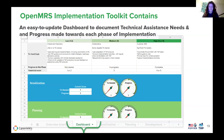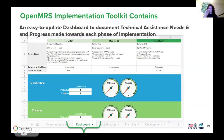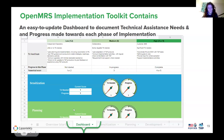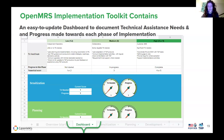We put together a very simple dashboard to document the technical assistance needs and progress made towards each phase of implementation. It has across the different stages — sensitization, planning, and development — what kind of technical assistance you would need and how far along you are. So just at a glance, you can see where things are in terms of your implementation, and we provided guidance at the top for what these numbers can mean, to help you use the toolkit and the dashboard consistently.